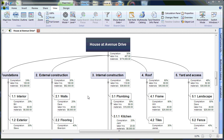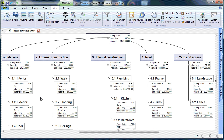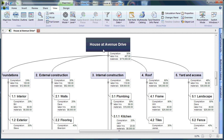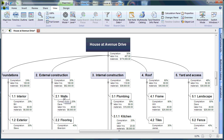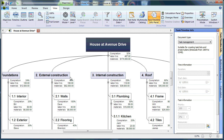To speed up this example, I've updated all available stage levels with completion levels, labor hours, and materials. As you can see, all levels are rolled up to create your 100% rule. Each phase has its specific completion level based on the sub-stages listed below. As stages are updated, the main phases update as well as the main project level — currently 30% complete. For instance, updating Walls to 100% completion will update that phase and increase the overall project to 32%.